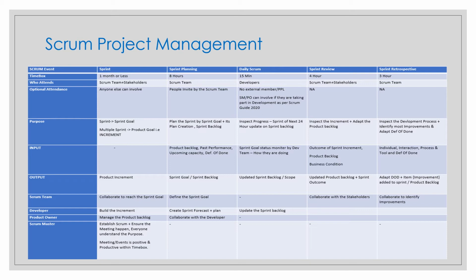And the scope can be renegotiated with the product owner at any time. The idea is to meet the sprint goal while making some compromises, usually in terms of features, never on quality. In this process, the product owner and the developers decide which is the best course of action. Okay, so an item can be replaced with another item from the product backlog, or anything is possible as long as the sprint goal is not in danger.